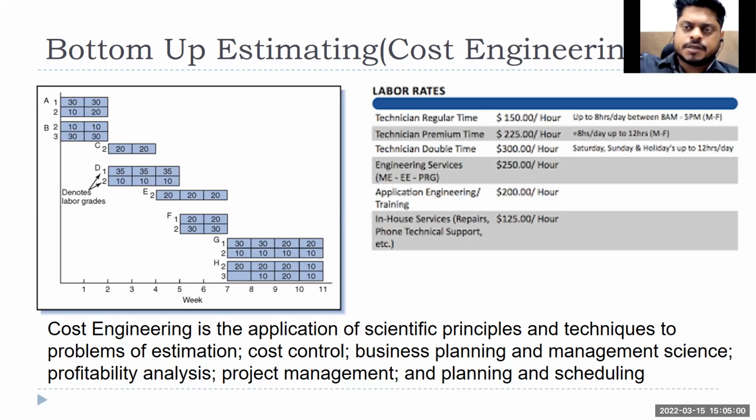It is always stepwise. Maybe they will provide 10 percent or 5 percent as an advance, but it is always a stepwise payment. You complete 20 percent of the work, 200 crores of work, go and show the documents, and auditing will happen. Somebody from the government will come and check that yes, this much work has been done. They will certify that, and you will get 200 crores.